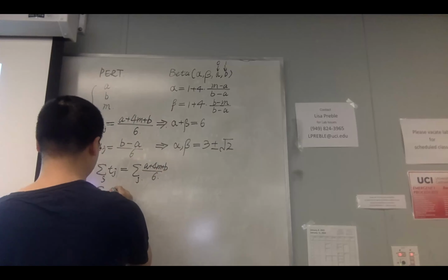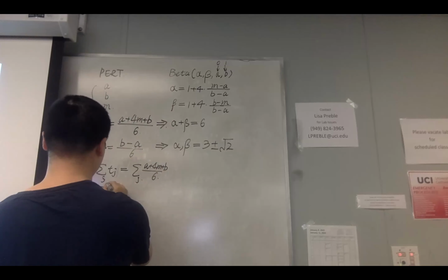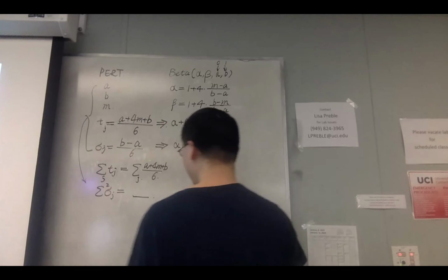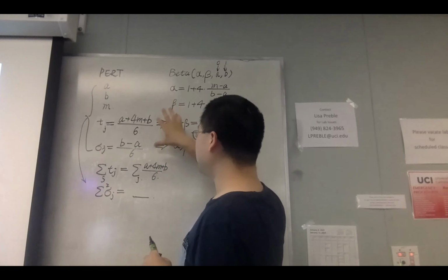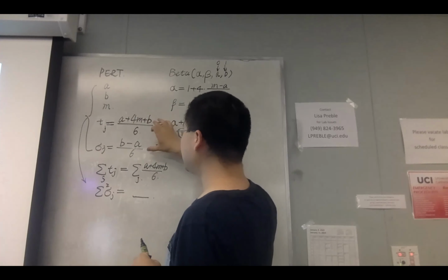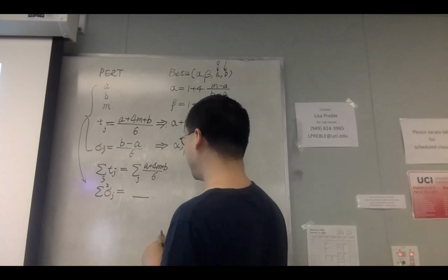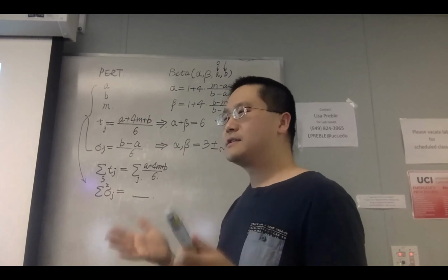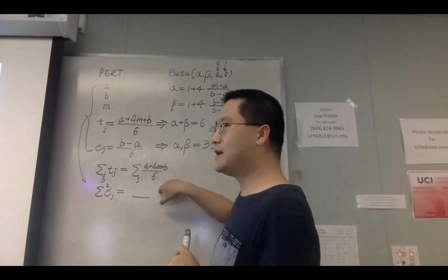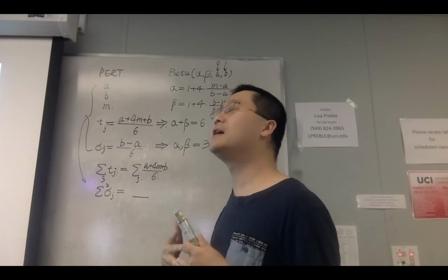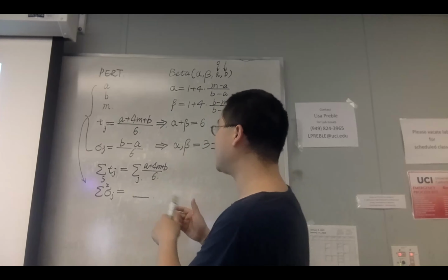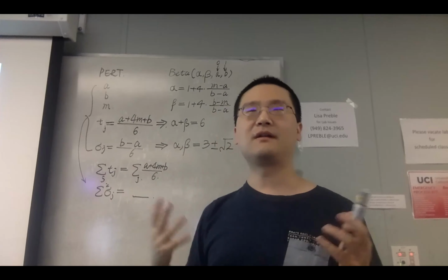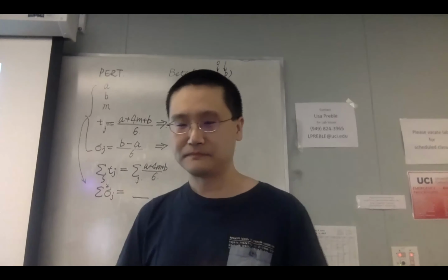And we also calculated these quantities. If we have some errors when doing individual activity estimation for duration and the standard deviation, how well does this go? So last time we learned that the central limit theorem comes into play because we assume all the activities are independent from each other, and the number of activities, that's the count of j or the largest j, is large enough so we can use approximation.